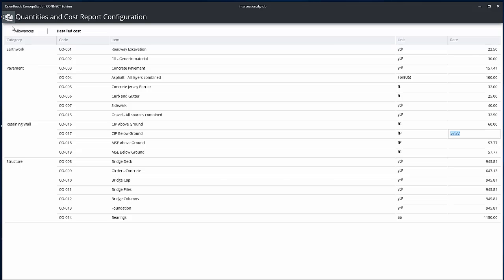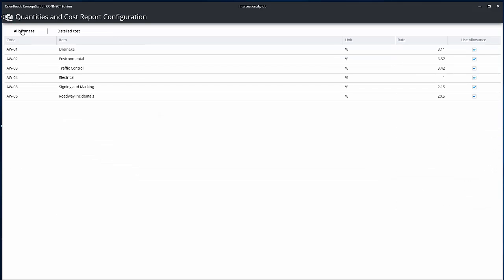Allowance costs are for items that are not specifically modeled in the concept but are known to be part of the cost of a project. The values in the Rate column can be changed, and the Use Allowance column determines if the allowance item is included in the cost estimate.